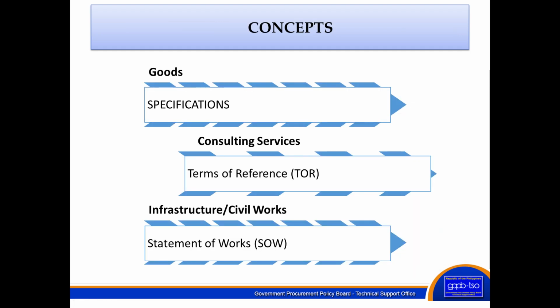So the concepts of specifications writing could be classified into 3 types. For goods, it is enough that you have your specifications. For consulting services, you need to establish the terms of reference to set the minimum standards and coverage of the services, as well as to avoid confusion on the terms of the contract.